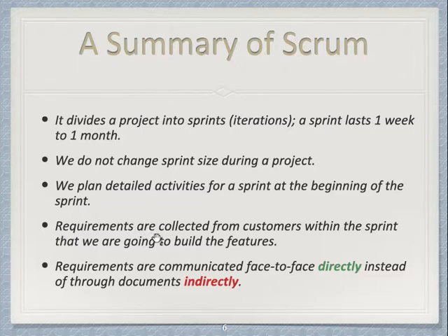So how do they communicate the requirements? Well, there should be an on-site customer who will always be available to the development team. So the development team can always walk over to the cubicle of the customer or make a phone call and talk to the customer and say, can we clarify this? And then the customer representative should be available to answer all the questions. And this is how requirements are communicated. So in Scrum or in most agile methods, communication between people is verbal rather than through documents. So this should reduce the amount of work.